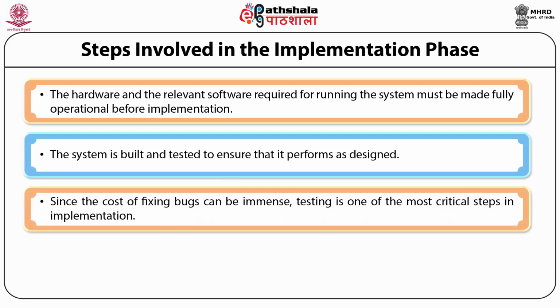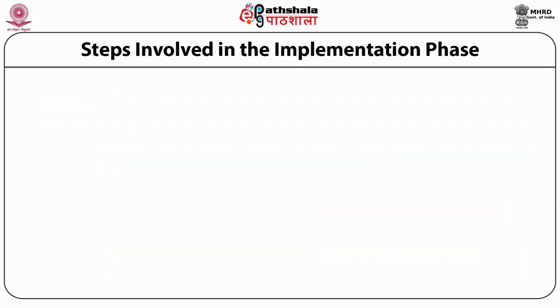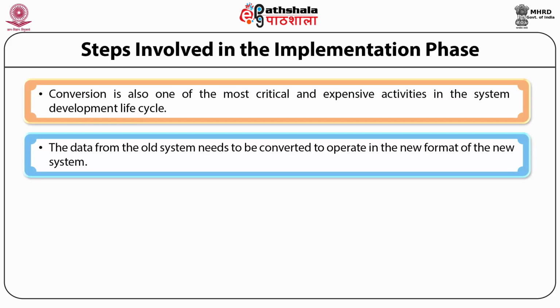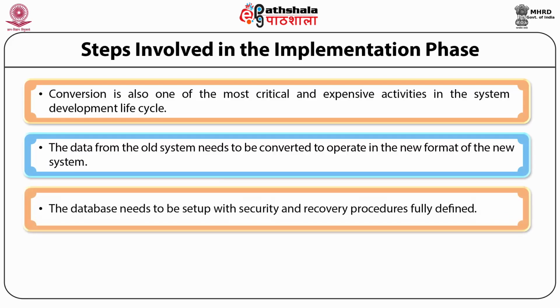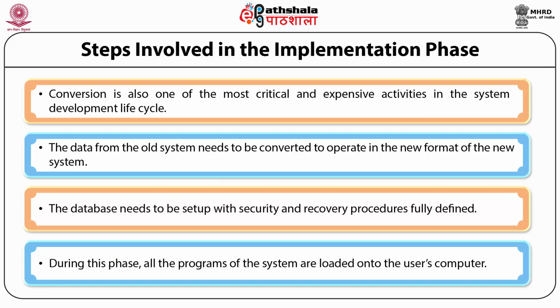The cost of fixing bugs can be immense, and testing is one of the most critical steps in the implementation. Most organizations spend much more time and attention on testing than on writing the programs in the very first place. The second step, conversion, is also one of the most critical and expensive activities of the SDLC. Data from the old system needs to be converted to operate in the format of the new system. The database needs to be set up with security and recovery procedures that are fully defined. During this phase, all of the programs of the system are loaded onto the user's computer.